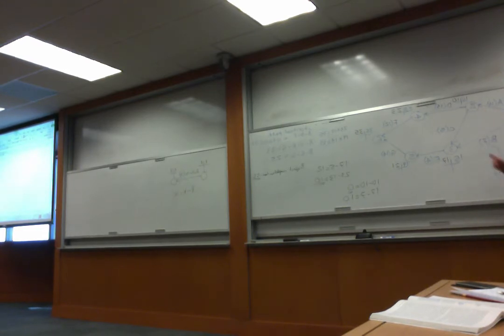One more time, for each activity we're going to ask the question, is this activity part of the critical path? It is if all three conditions are true. Let's take A. Where does it start? At 1. Do we have equal numbers at 1? Yes, check mark. So the first condition is met. Next condition, where the activity ends, in this case A ends at 2. Do we have equal numbers at 2? 10 and 10, equal.